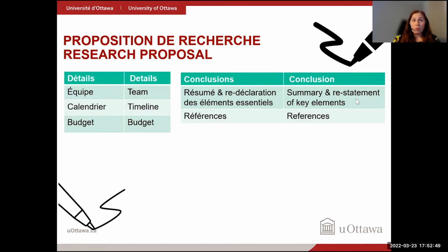With the fourth section of the proposal, you should cover all the project specificities. You give details about procedures and technicality and implementation issues. What are the challenges? What are the deliverables that you're hoping to get out of this? And for this, you specifically talk about your team, who are your members, their duties and functions. You should specify your timeline, all the activities that will be involved, and the start and end time for each, and the budget that should cover the cost of equipment, whether purchase or rental, the salaries of the people who will be working, fees for publication, application fees, all of this have to be included in the budget.